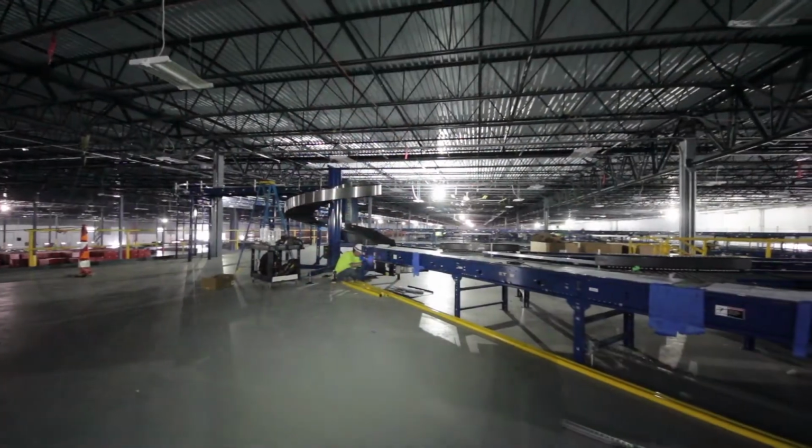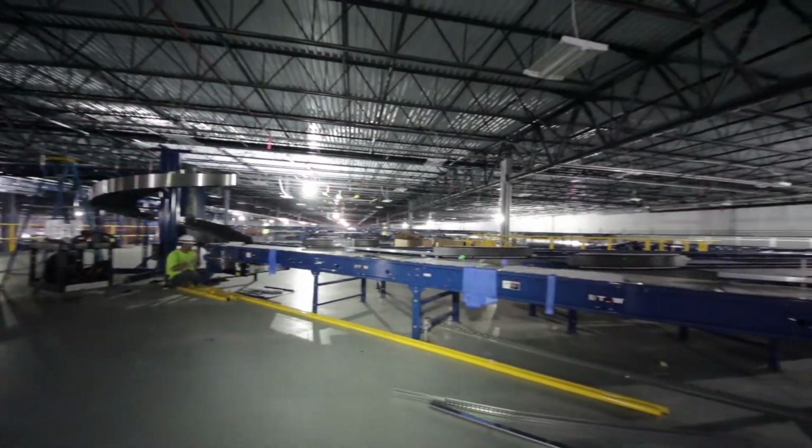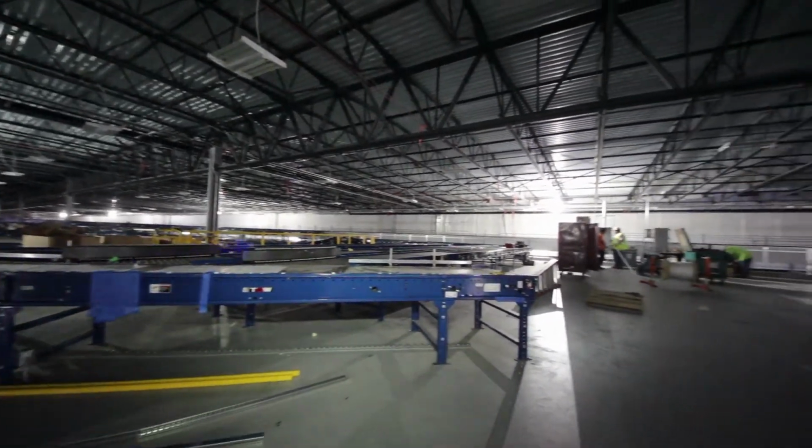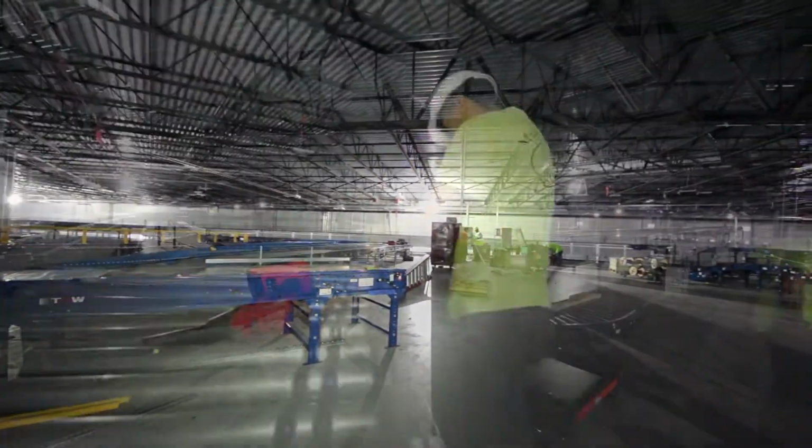I'm Matthew Belsick. We're back on site at Lakeshore Learning in Midway, Kentucky. We're on week 10 of our install. We're currently on the shipping mezzanine, where we've got 95% of the mechanical install complete, and we're about halfway through the electrical installation.